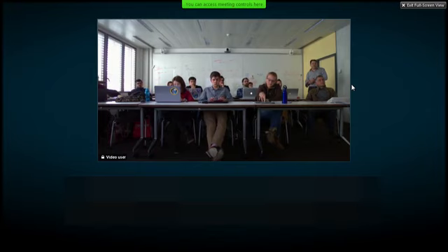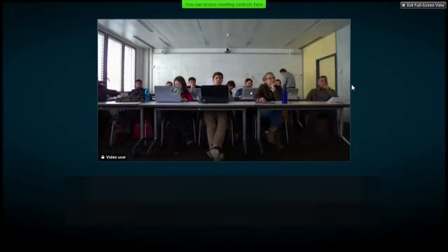But I think for all of you engineers here, in the next 10 years, you'll be just hoping there's not so many of these ADITs in the specs you will get, because you will have to answer. It's part of the specification, actually. Yeah, and how it's demonstrated, that's different. Well, and the point you're making, Volker, is that this is a contractual requirement, right? This is not optional. Absolutely. Yeah. It's not optional, and it has to be part of the pricing, right up in front of before phase A. Yes, very good points.